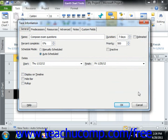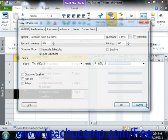When you set the duration of a task, remember that Microsoft Project will schedule the task as soon as possible, but only scheduling time during the available work hours that you allowed for the project using the Calendar choice within the Project Information dialog box.